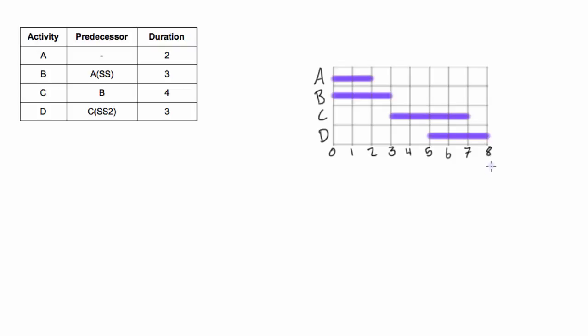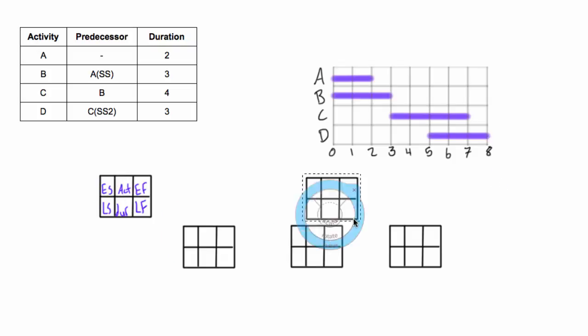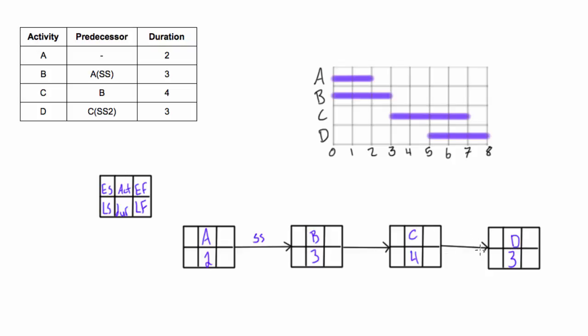Now let's go ahead and draw our PDM network diagram and we need to specify which of these arrows aren't regular finish to start relationships. That will be the relationship between B and A because B depends on A, it's a start-start relationship, so we'll write SS with no lag because there is no lag there. Also on this last arrow from C to D, D depends on C and it's a start-start with lag of two, so start-start and we'll put in that two, SS2.